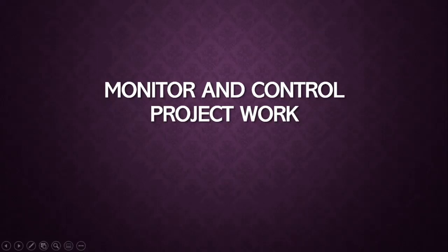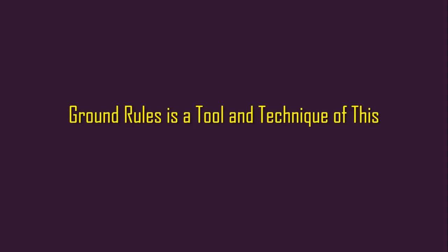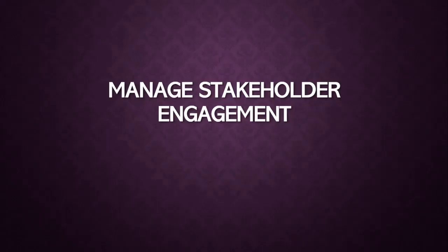Let's go to our next one for today. Ground rules is a tool and technique of this. Which process are we talking about? 5, 4, 3, 2, and 1. Ground rules is a tool and technique of one process and one process only, and it's manage stakeholder engagement.